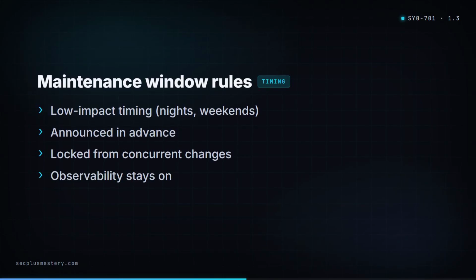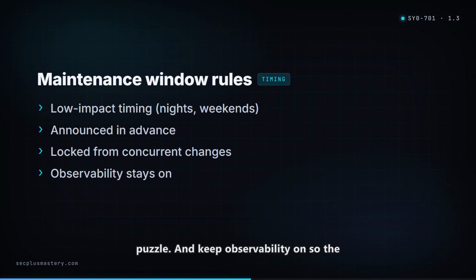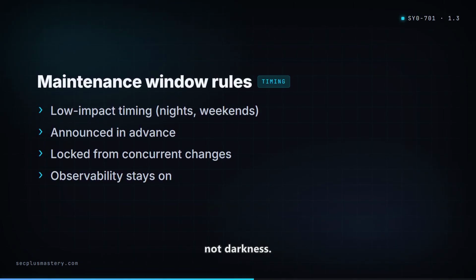Announce it in advance. Lock it from concurrent changes, because 5 changes in one window turn a single failure into a "which one broke it" puzzle. And keep observability on, so the team works in light, not darkness.